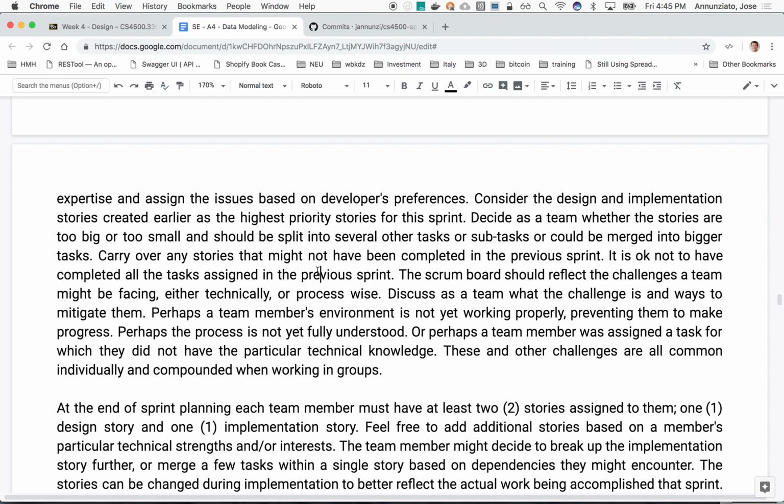Also, I would assume that perhaps each one of these stories might be a point or 2. I'm guessing that a maximum of 4 points might make sense for the sprint, and that you should not carry more than that in a sprint. Now, if you do have some stories from previous sprints that have carried over, that puts a sprint at risk, right? That you might not complete the actual sprint. That's fine. It becomes more and more risky that certain milestones will be hit down the road, but that's the nature of project management. We either have a set of stories to work on and a movable delivery date, or a fixed delivery date, but we can't have both.